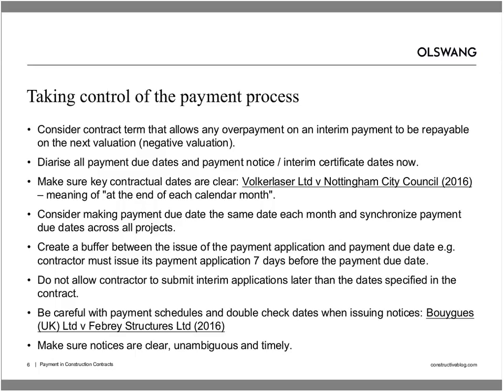And whilst there may well be situations where you want to help the contractor, and if it makes an early or late payment application, you're perfectly happy to pay it, then I would recommend that you do so, but do so making it clear that you're not giving up any right to insist upon a proper payment being made on time in the future.